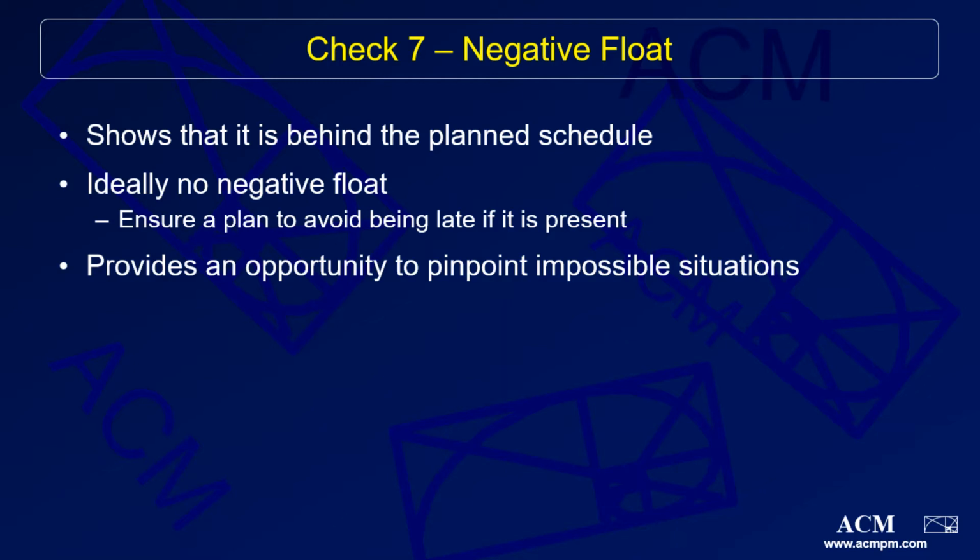Ideally, there will not be any negative float within a schedule, but if there is, make sure that your project team has a well-documented plan to avoid being late. Negative float can actually provide an opportunity to easily pinpoint any impossible scenarios that are within your project.